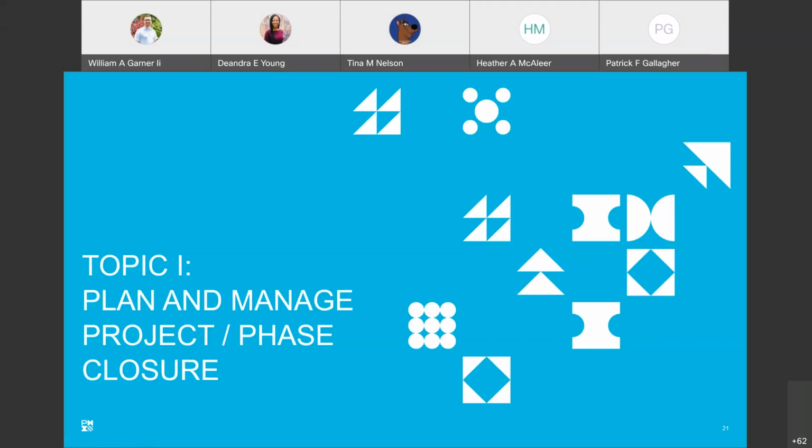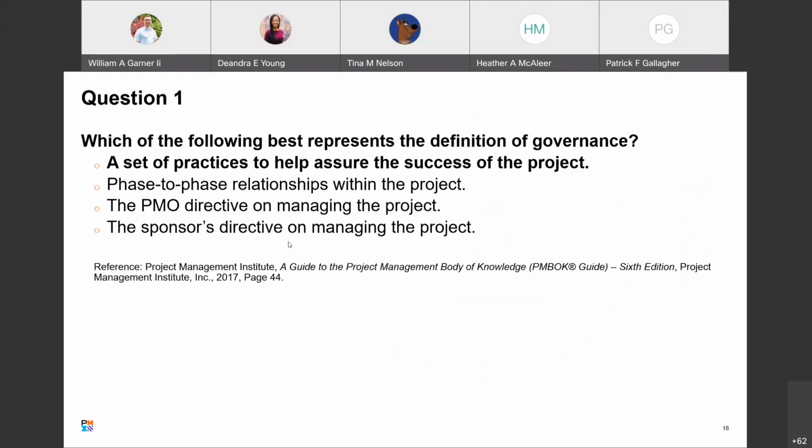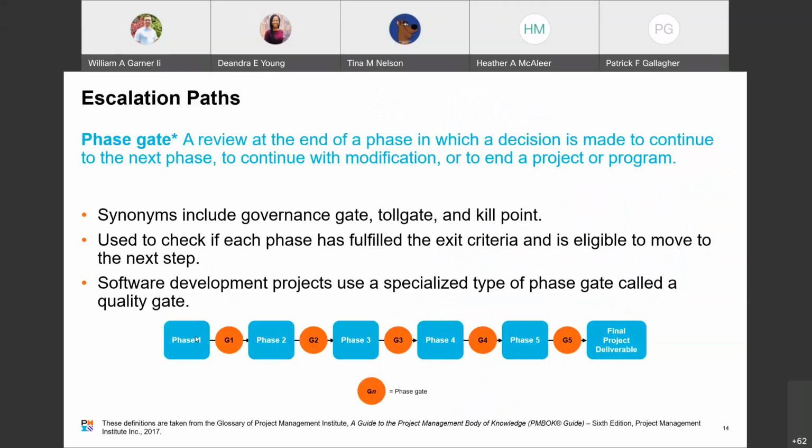Everybody gets that when you have a multi-phase project, that's defined at the very beginning of your project. You're going to define this. When you have a multi-phase project, process, call it, there are deliverables that have to be met. They're predefined deliverables that have to be met. At the end of that phase, you get approvals that I meet all the metrics and all the requirements of each phase. Let's go back to that cool diagram. So phase 1 completes. You've got all of your metrics. You've got all your deliverables. You've got everything taken care of. That's part of your checklist. It's done. You just need to verify it. You need to present it, and it goes to a gate.